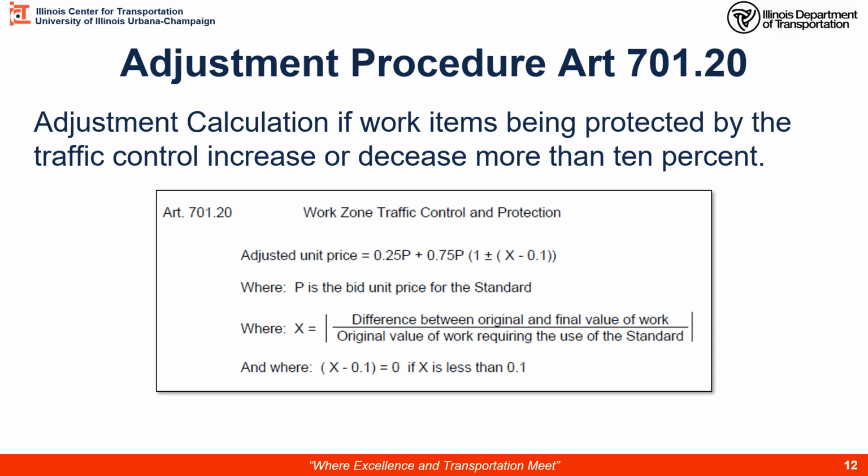And we'll go through a little formula here to come up with the adjustment. The X is critical in that adjustment. And you'll notice we're going to subtract off a tenth of whatever the value of X we determine is. And it's basically that the error in bidding and estimating for the contractor and their risk is basically 10% of what they provided. So that's withdrawn in the calculation.